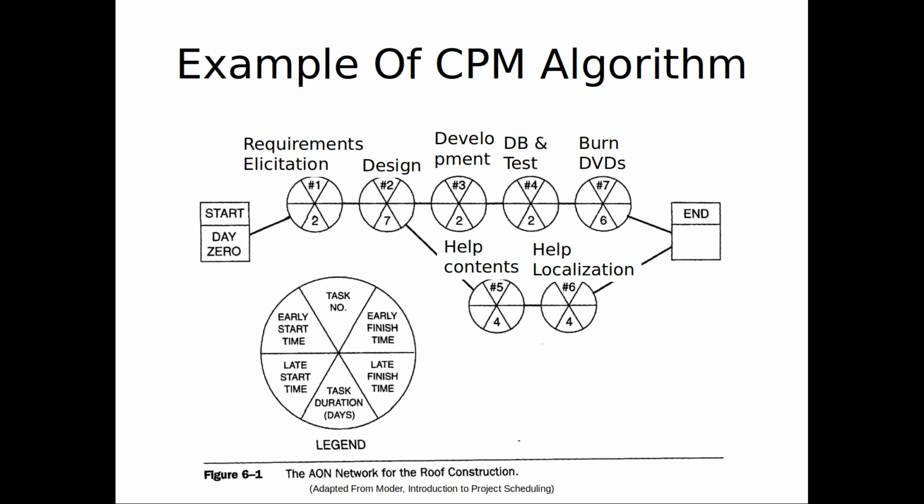If there's any other node that depends on, like, number 2 being done by time 3, then to avoid delaying the project, number 2 has to be done by time 3, right? Do you understand that point? So going backward, when we have this kind of split, and we see it at node 2, we have to take the minimum of the times, because we have to finish that node by the earliest of the times that are needed by our successors to avoid delaying the project. Do you understand that? It's like we have the strictest constraint in place.